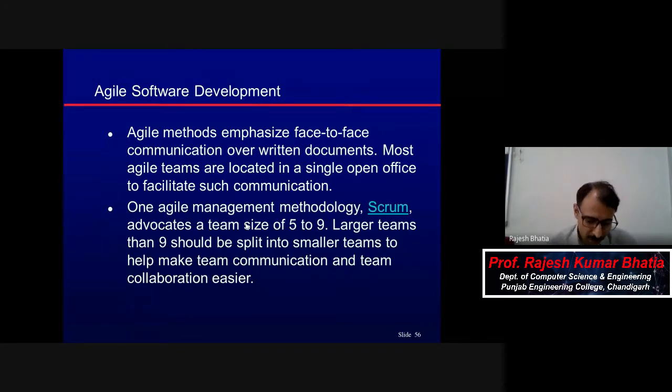Now, in waterfall, requirements are frozen in the beginning. Until your requirements are stated properly and frozen, you cannot move ahead. It is problem definition, then analysis, then design, and then development. Each and every phase needs to be completed first, and then you can move to the next phase.